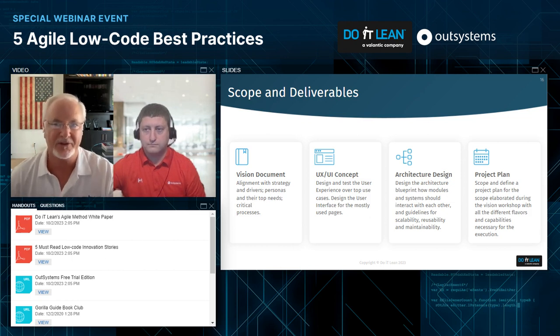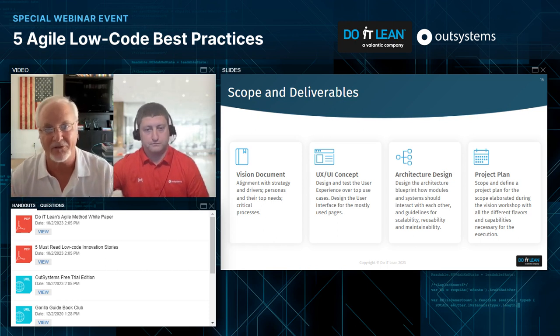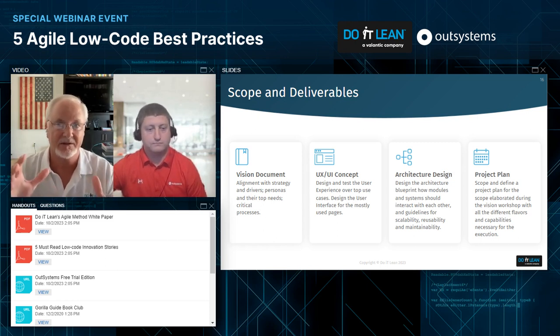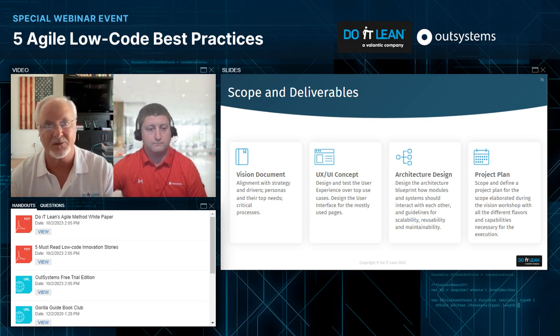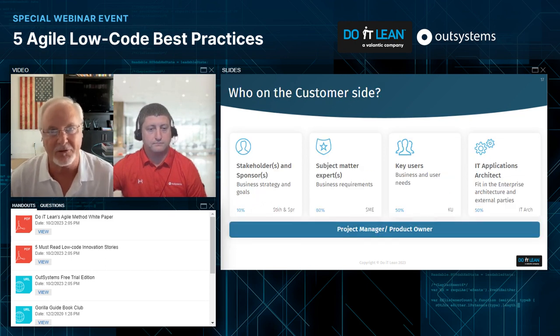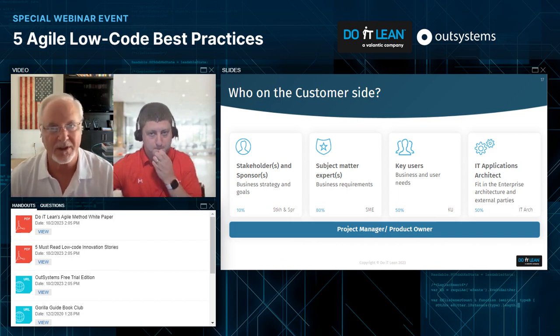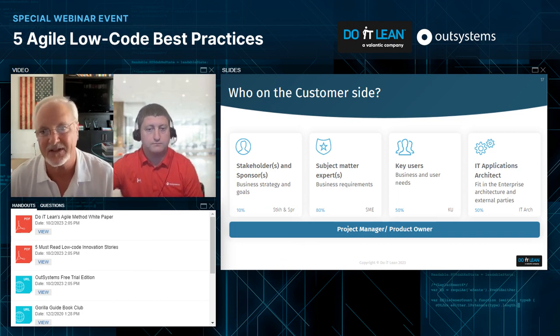Now, we do this type of work in what we call a discovery experience. So a discovery experience, as I said, is a 2 to 3 week exercise where we work across different business lines to gather context, identify goals and roadblocks, make sure that we've got all the different involved end users identified and accounted for so that we can design and envision the right customer user experience. Coming out of a design or discovery experience is some key deliverables. And the most important, I believe, is what we call a vision document, which really captures all of our findings, the key strategies, et cetera.